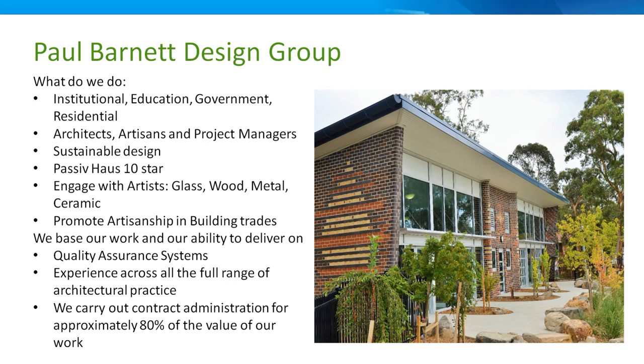There was risk in that, and we came across a few things that challenged us because everyone was working so fast. And all the connections that you make over time with your consultants and trades and builders and suppliers were fine, but at that time there was 2 or 3 times the amount of building work, so everyone had trouble delivering. So that presented its own level of risk.